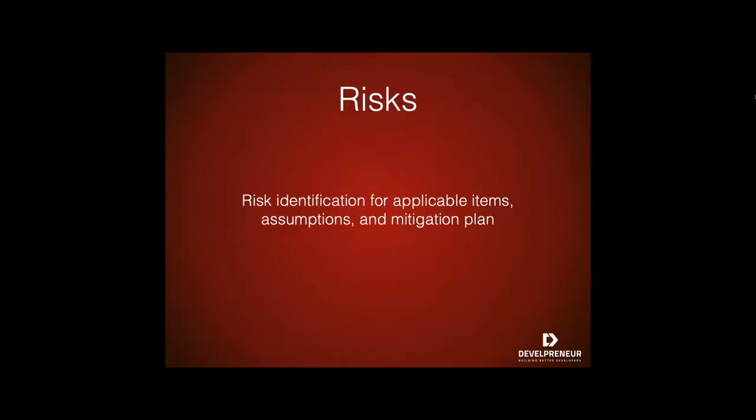The risks. So what are the overall risks to the project with an emphasis on the testing process? Now, this isn't risks from the development. This is for the actual testing. So some of the things we can run into: lack of personnel resources when testing is to begin, lack of availability of required hardware, software, data, or tools, late delivery of the software, hardware, or tools, delay in training on the application and or tools, changes to the original requirements or designs, specifically what will be done for various events.